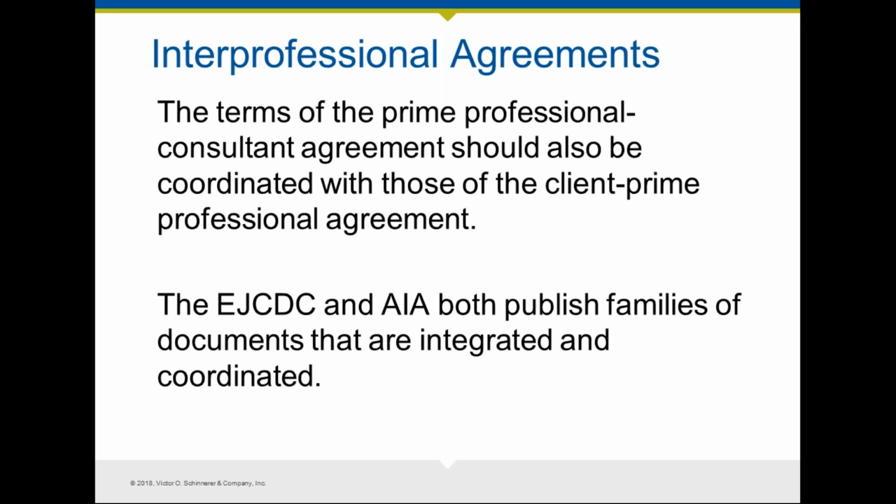Oftentimes, from a risk management standpoint, if the sub-consultant really does want to limit their liability, the arrangement can be made to have that sub directly contract with the owner instead of through you, and then have the owner assume the risk that if their services don't meet the requirements, that the limitation of liability applies to the owner, and that's the risk that the owner takes. So those are some of the issues that would need to be addressed in your sub-consulting agreements.